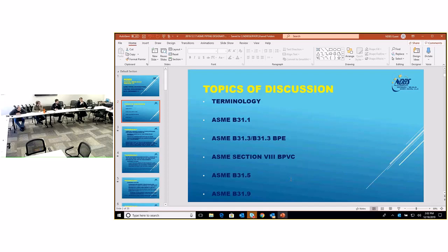Well, another key point is that this stuff costs money, but it also takes a lot of time. It's a man-hour shark. It just eats you up. So if you're on a job with this type of work, or where you have documented testing, you have to build that extra time into your schedule so you can execute all of this properly. Because the last thing you want is somebody getting hurt and we're not documented, or causing loss of product.